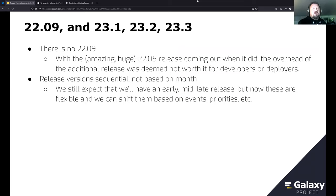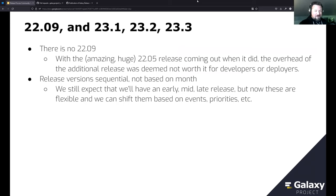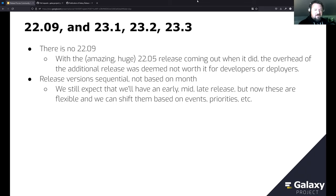For 2209 there is no 2209. The 2205 release was huge and came out so close to when we would freeze for 2209 that we decided not to do it — the overhead for developers and deployers and the narrow gap between what would be in 2209 versus 2205 wasn't worth it.